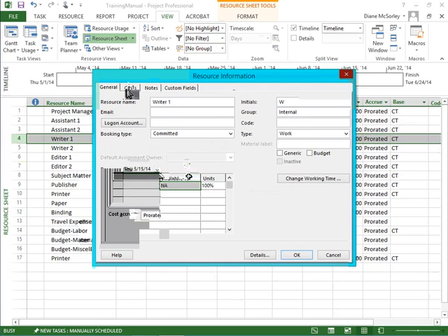And I could type in a new number, so if they told me it was going to be 33 or 35 or whatever, I could put it in. But let's say what I've heard is they're getting a 10% raise. Nice. I can type in plus 10%, and when I press tab, it'll calculate for me. Yeah, and I can do the same thing for the overtime rate. Plus 10%, I press tab, and it'll calculate for me. So now the new rate goes into effect on May 15th.